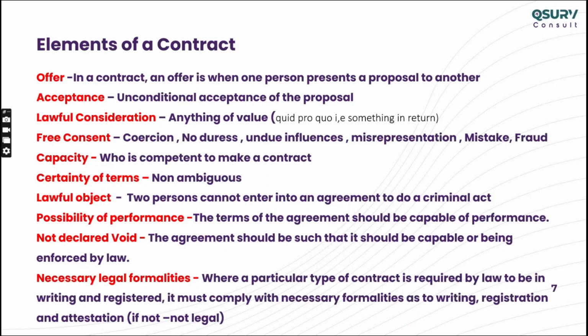It depends from which point of view I review the contract, employer side or contractor side. If employer side, I will check my responsibilities, what I shall give to the contractor, my obligations, and what the risks are. Who will bear the design responsibility? Who will provide electricity and water? Like that. Got it.